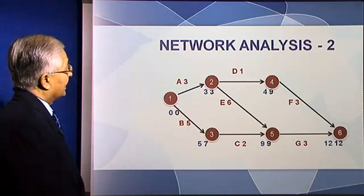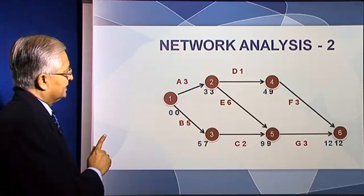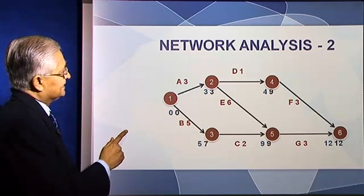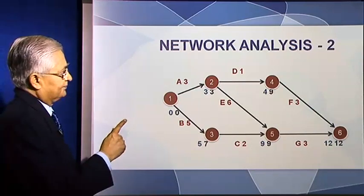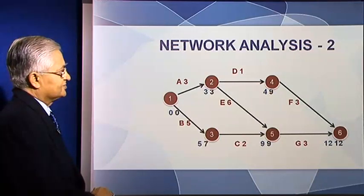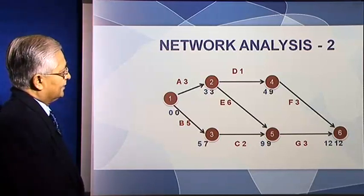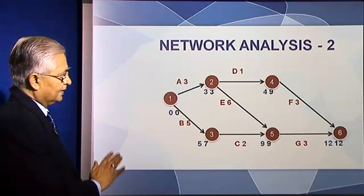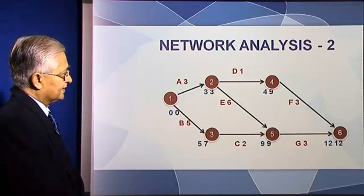Now let us look at circle four. The earliest we have reached circle two is at the end of the third month — the blue figure. Activity D takes one month, so the earliest we can reach event four is at the end of month four, which is the blue four shown there. Now let us come to event five. To reach event five, activity E needs to be over and activity C also needs to be over. Two activities need to be over to reach event five.